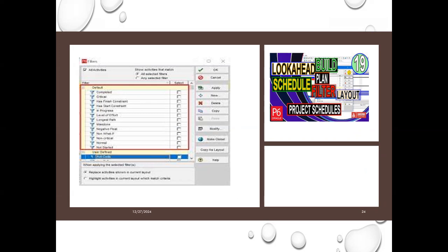Under this concrete activity, there are also some activities in red. Red means this activity is a critical path activity, or critical activity. That means if you, the subcontractor, delay this activity, you are going to delay my project as well. So very simple, I can extract the data. So we will learn how to extract the data. In Primavera, we call it filtering the activities. How to create filters, multiple filters.